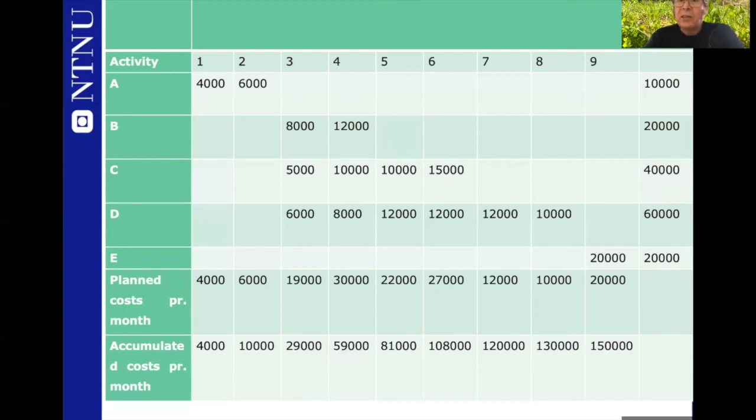Now, in order to use the earned value method, we need to accumulate these costs. Accumulate to see what will be the accumulated total cost per month, not in each month.